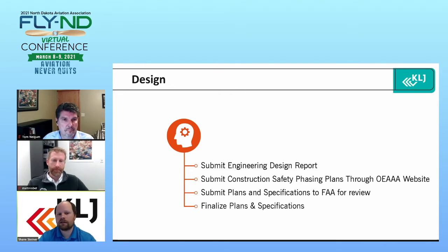So then the next part is the construction safety plan. That needs to be submitted through the OE-AAA website, which I'm sure a lot of you are familiar with. And the FAA does have a handy SOP for the submission of your construction safety plan.